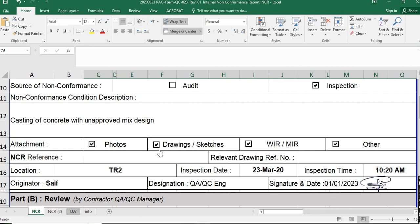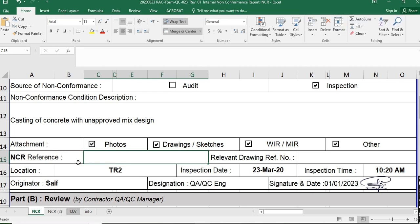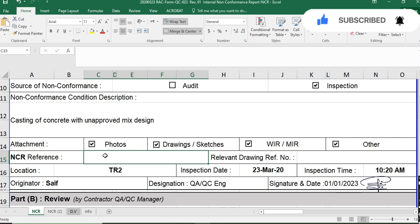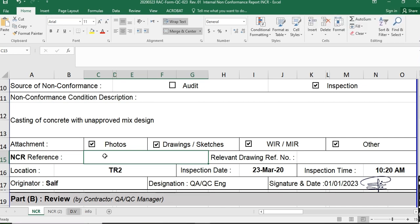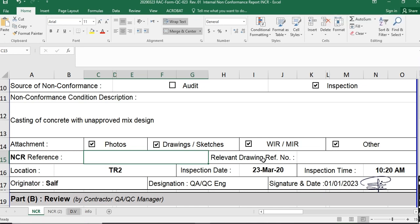You can also attach a WIR, MIR, or any other document such as the specification. In this area you write the NCR reference number. Sometimes we receive an NCR from the consultant, so in that case you also issue an internal non-conformance report and write that consultant NCR reference number here. If there is no NCR from the consultant, no need to write a reference number. You also fill in the relevant drawing reference number and any approved shop drawings location.